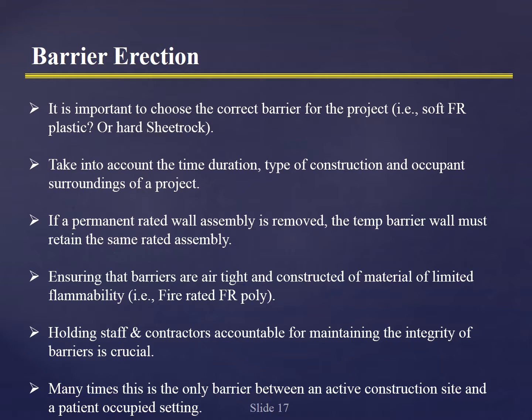You've got to take into account, of course, duration because of what's going on, and not just because of the type of construction, but sometimes noise is an issue, vibration is an issue, even sight can be an issue. There are times where you do not want people to see what's going on that could cause them to become uneasy or feel nervous or concerned.